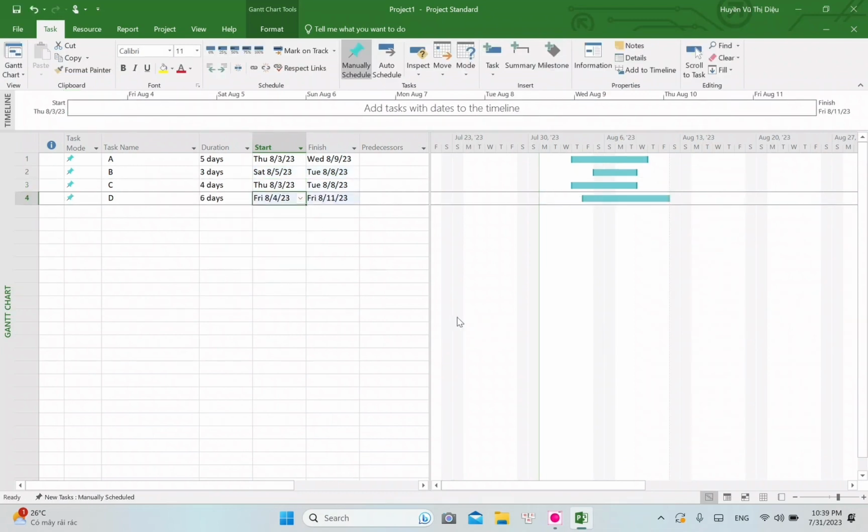This task is represented as a bar placed on the Gantt chart and kept updated according to the task's content. When we press the taskbar like this, the tasks will show the effect of modifications. By default, workers take Monday up to Friday as working days, shown as white columns, considering Saturday and Sunday as non-working days, so gray columns. If we move or extend any task toward the weekend, it simply extends in order to cover its total duration, expressed in working days.